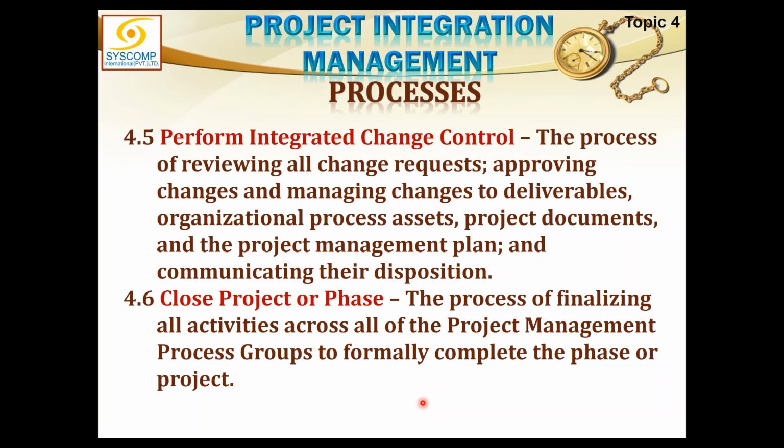No, they can't do any changes by themselves. If a change request is not approved, they are intimated that this change request which you requested or someone else requested is not approved, so you stay put. You keep working as you were working before. So that's how the integrated change control ensures that proper change control procedure is followed.